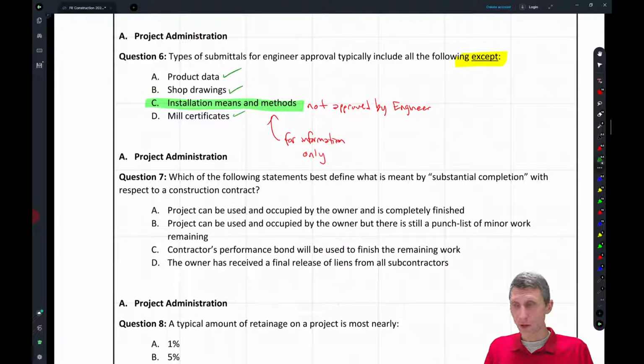All right, so project submittals, that's what they're for. That's the project engineer's role, to review and approve them. And the language on those submittals is always so squirrely. It's like, for general conformance with the project specifications. Approval's kind of an even strong word in this case, it's more like for review, right? So the engineer reviews it, it makes it work, okay?